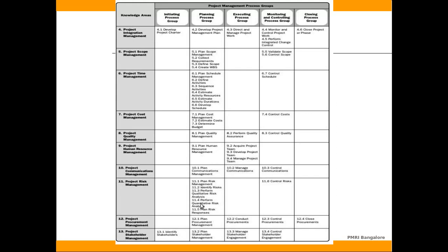To summarize: we are dealing with PMBOK version 5, which comprises of 47 processes grouped into 10 knowledge areas, and these are again grouped into 5 process groups of Initiation, Planning, Execution, Monitoring and Controlling, and Closing.